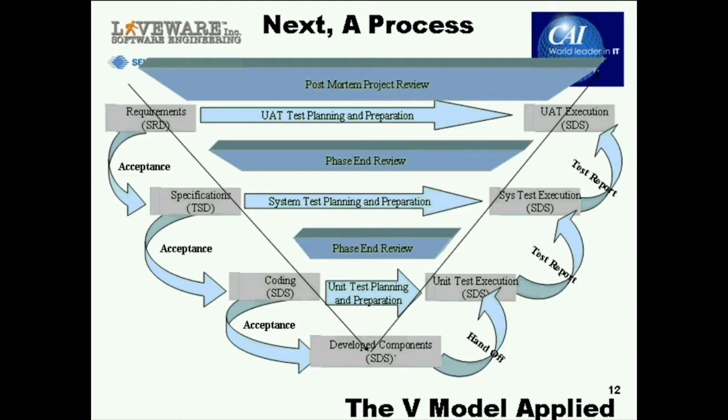People tend to say that they get the validation out of the picture right at the beginning because they get the requirements right. But requirements change, the users express what they need, but they don't really know it. So what we've taken for granted when we show them what we've built is completely different from their expectations. There are changes to the environment that produce changes to their needs. If the technology is not new, they probably articulate their needs in such a way that they're trying to bridge the gap between technical people and their business, and they're trying to do it through their own understanding of technology. They might even interpret things differently from developers.